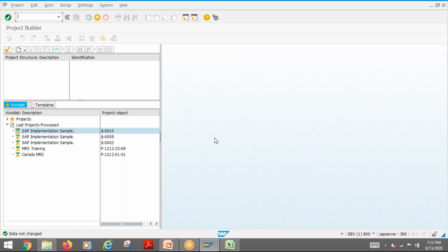Abdul, today scheduling is almost like a forward scheduling, right? Yes, it's a forward scheduling. But why is it forward scheduling? Because the system automatically considers forward scheduling because of these two conditions. One is you are using backward scheduling, and that date is not realistic. Within that time period, it is not possible to complete the project, and you are not allowing scheduling in the past. So the system automatically takes today's date as a cutoff date and schedules forward.